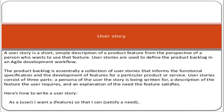In the scrum framework there is a concept of a user story. A user story means the functional requirement or a requirement of a customer. For example, if you are implementing an e-commerce solution and the customer wants users to be able to pay by credit card — that is a customer requirement or functional requirement. A user story is a short, simple description of a product feature from the perspective of a person who wants to use that feature. User stories are used to define the product backlog in an agile development workflow. The product backlog is like a scope document that contains all the user stories or functional requirements of a customer for the product.